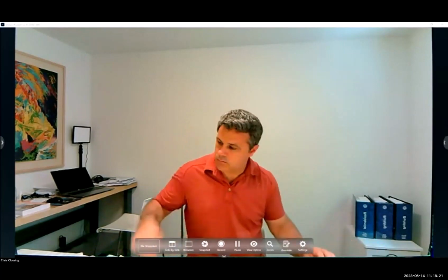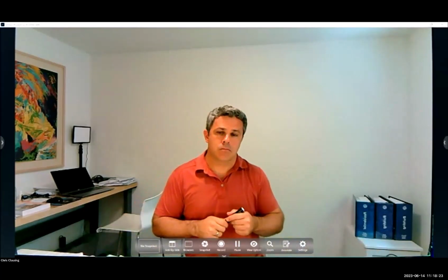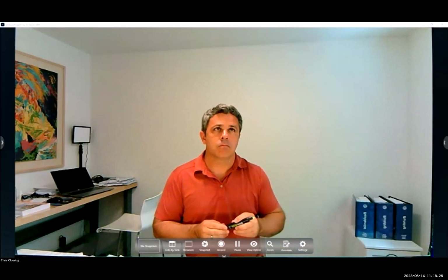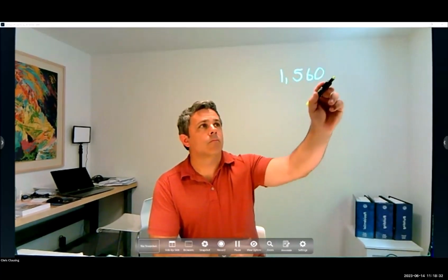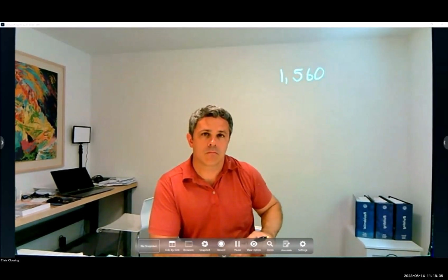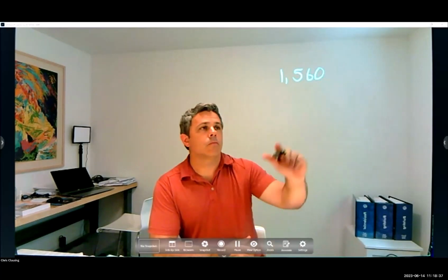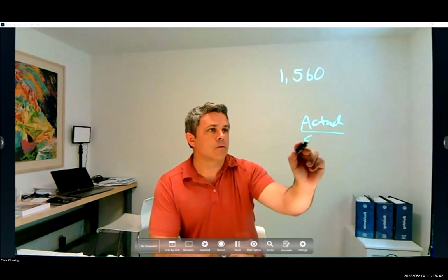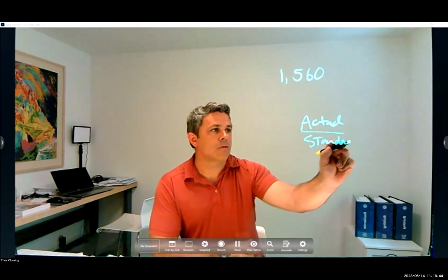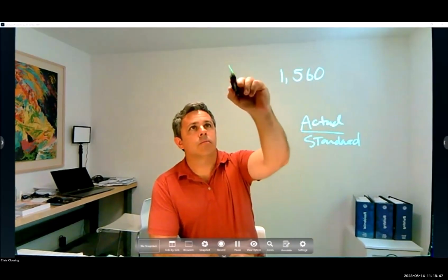Was it a particular question on the exam? Yes, it is basically saying ABC Construction was estimating the cost of doing a new remodeling job. If the total estimated hours of the new job is 1,560 labor hours, based on the actual to standard ratio of 1.3 to 1, what are the standard hours the job should take? Gotcha. I was trying to find something like a table or how to calculate this, and I couldn't find it.